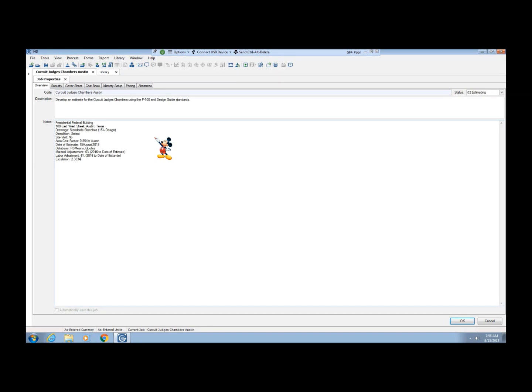Now, if you're renovating a project that is very complex or very limited in space, or something is causing you to not be able to work as efficiently, maybe security, those kind of things, you'll address that here, and we note it.